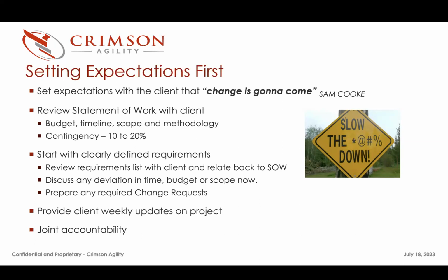in our project kickoff meeting, we tell them there's likely to be change. Starting with clearly defined requirements, we do a design and planning phase of the project. It should be within the first few weeks. Anais and I are going into this new project telling them this project has a 10-week timeline. If you want to stick to that 10-week timeline, within the first 2 weeks, we need to complete this. Let's schedule the meetings. Let's get this done and make sure that we can complete everything that we need to within the first 2 weeks.